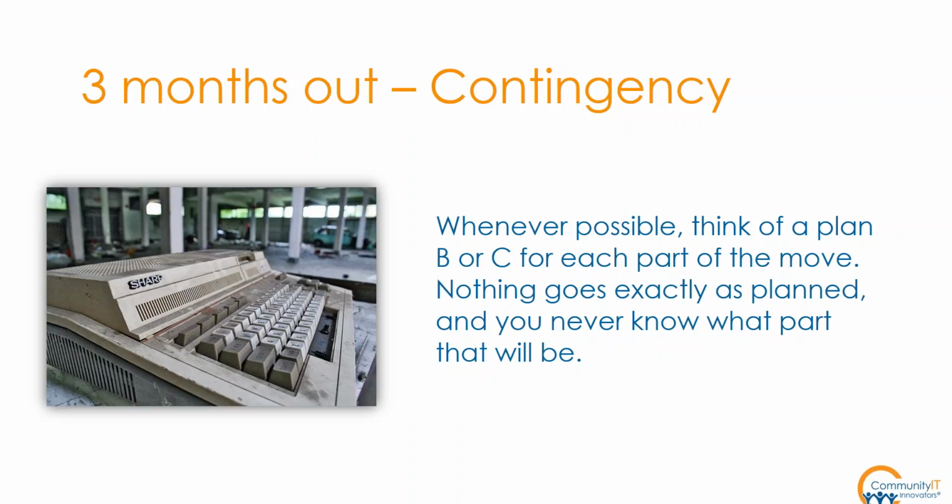I think we mentioned later in here that if you have cloud services for emails, your website, all that, it really goes a long way to minimizing the worst possible things that can go wrong in an office move. But yeah, more or less, a lot of this is just we can't hit home enough. Make sure the ISP is square and on schedule, because that's the one thing we just can't replace or patch around. If you don't have internet, you don't have internet, and your new office doesn't do anything.